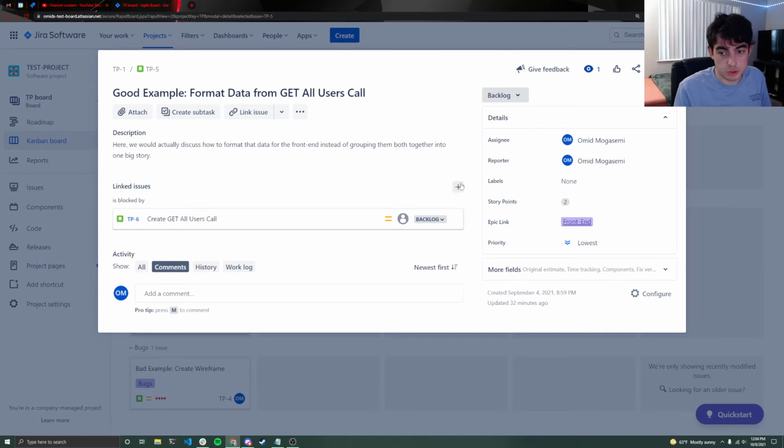See this one right here is 2, that's pretty decent. If it's greater than 5, maybe it's okay if it's a rare case where you can't break it up, but otherwise, generally, if you're going over 5, you should probably try to break that thing down.